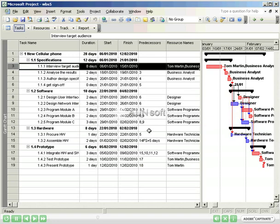You can save many baselines in a project and it is not uncommon to do this at the end of each phase. Remember, however, to always keep earlier versions of the baseline.